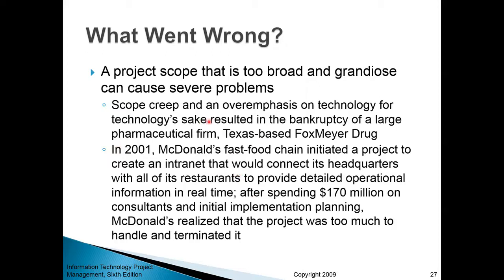One lesson is to do things on a small scale first. Don't try to implement ERP across the entire organization — try a small department or a single module like the financial module first, before rolling out the entire system. Similarly, McDonald's could have tried implementing the intranet for one city or state first, learned from mistakes, and then rolled it out to other locations. Starting small is a good solution to scope creep — where scope gets out of control and the project fails, sometimes resulting in serious organizational problems including bankruptcy.